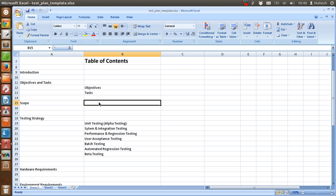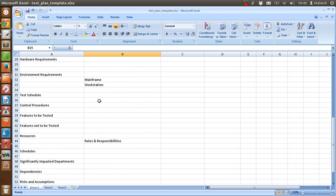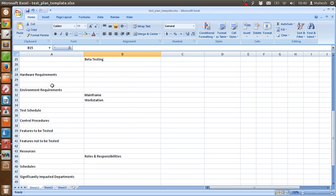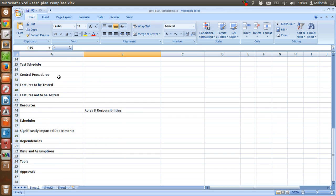After that, hardware requirements, where we are going to write about the number of components that we require to test a particular activity. Then environment requirement, for example mainframe, workstation, or any other software environment that is needed for the test. Then test schedule, number of hours and the deadline, then control procedure.